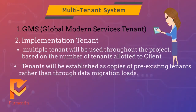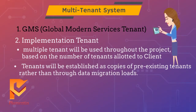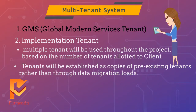Implementation Tenants. During your Workday implementation, from plan stage to deploy stage, multiple tenants will be used throughout the project, based on the number of tenants allotted to the client outlined on the scope of the project. These tenants will be established as copies of pre-existing tenants rather than through data migration loads.